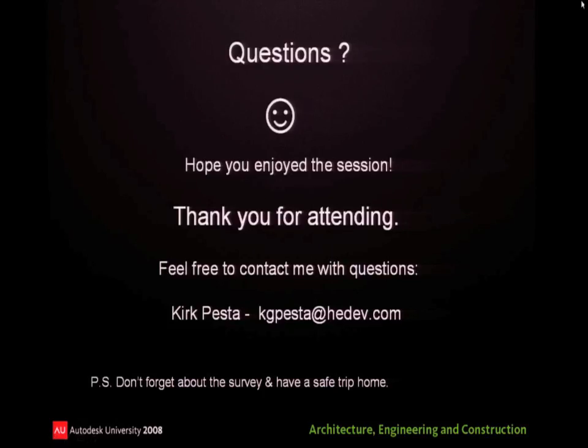Okay, two questions. One was the time it takes. Is there additional or less time? It takes more time right now. It just does. On the pilot project, it took probably 25% longer, but on the subsequent projects, it's probably closer to 10 to 15%. We are getting the data out of it now, which we didn't get before.